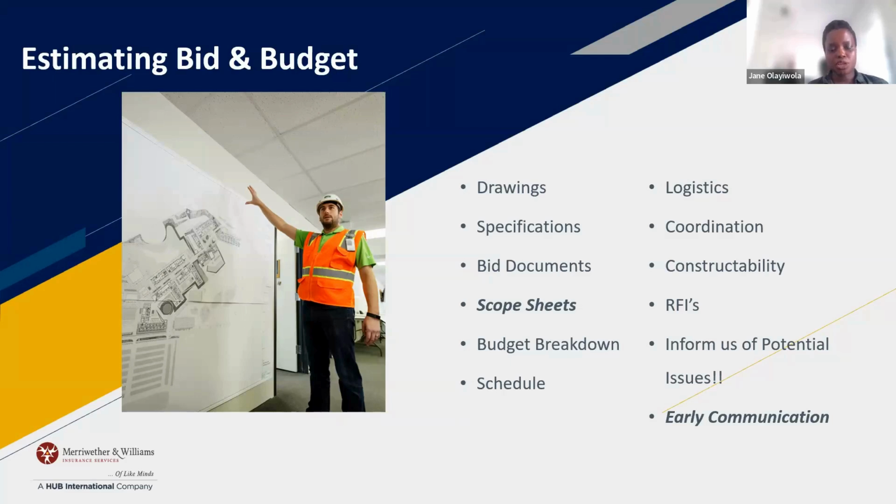You want to look through your specifications book. Everyone knows specification books. They're quite thick, quite lengthy, but you have spec codes that are assigned to your scope of work. So make sure you're reviewing your spec scopes in the spec book, because you will own that. And if you don't deliver what has been specified in the spec book, you will be liable. You might be liable for repair work. You might have to get new equipment. So that's really important to review all of those.